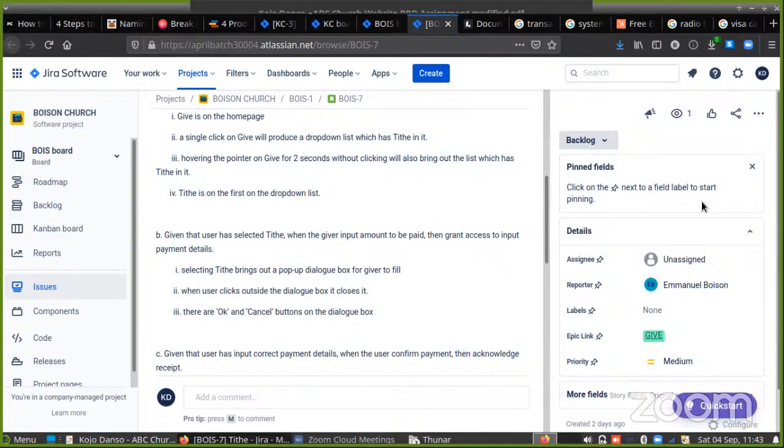In the case of this, take for instance, the payment does not go through. That only means that prior to here, you will not just get here before you do that. Before you even translate the thoughts, the ideas, whatever the requirement might be, into Jira for the development to start working on it, you should have worked that out with a stakeholder and gathered all this information before that time. It is not an afterthought that you come over here and now you are adding your own options. Okay, so even as the technical people, whatever we think of, we need to discuss with them and confirm before.